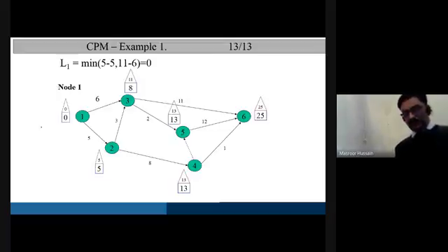So once you start finding the latest occurrence times and finally get to the latest occurrence time of the first event, if by chance you don't get the value 0 as a minimum value, there will be a clear indication that you have made a mistake somewhere during your calculations. So I suggest that for the last finding of latest occurrence time for the first event, do follow the procedure.